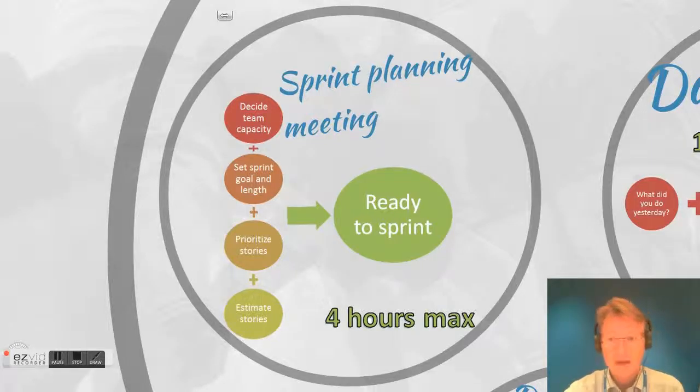Now, again, it's important that the sprint is not longer than you can keep changes out of it. Remember, we said we respond to changes and we're happy with the changes, but not during the sprint. Because the team has made a commitment to how much it can do during the sprint, and if that changes, there is no commitment. Remember the water glass? All right.